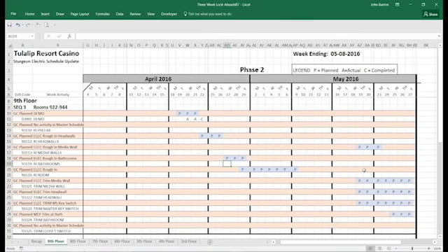So what we have to do is figure out ways to better use our time to where when we go up and we're installing prefab, perhaps in the bathrooms and the head walls and the media walls. So instead of having 7 days here in the field, we only have 3 days because we did it all up here in prefab when we wanted to do the work.